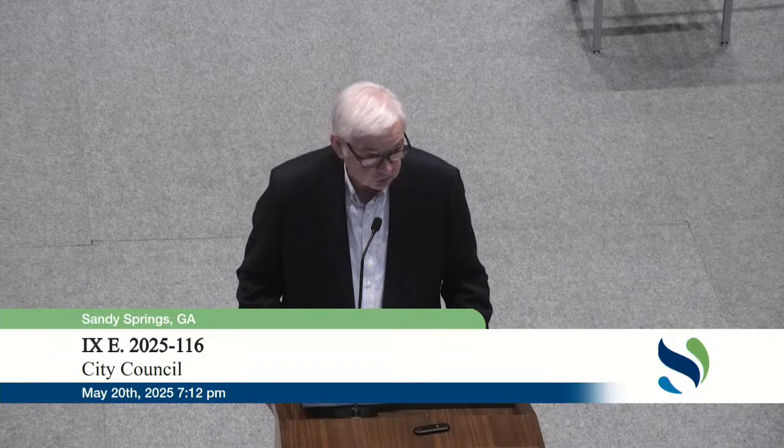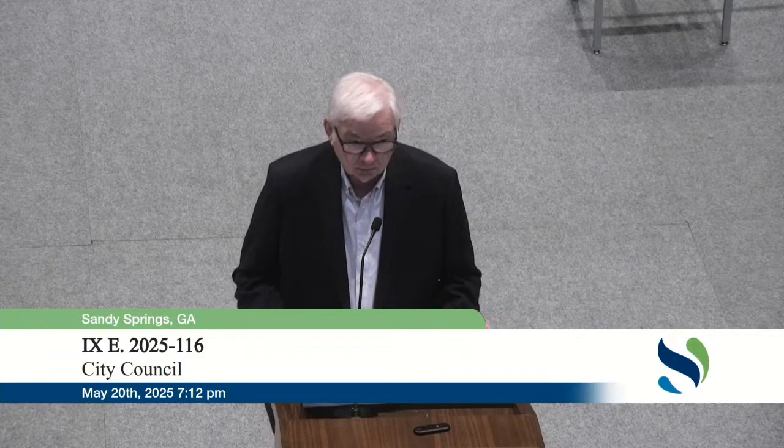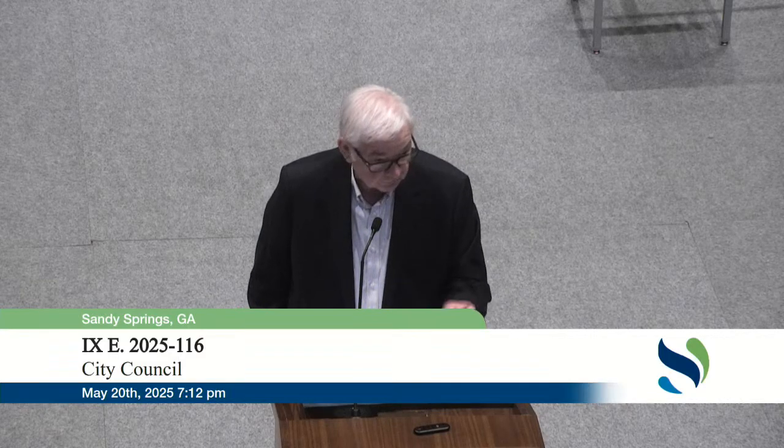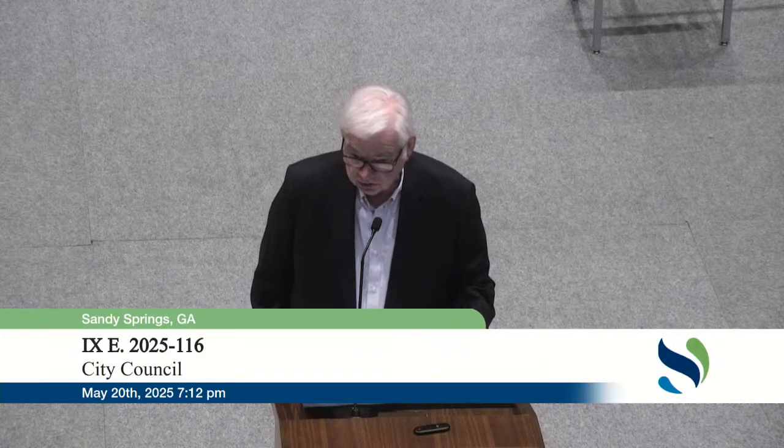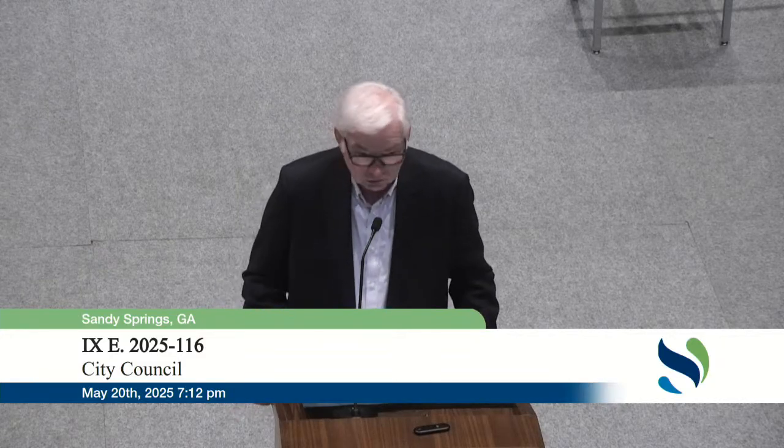With that, staff recommends this attached list of streets as the city's proposal to the state in the interest of receiving these some $1,276,784.86 of grant funds. The current estimate for these street repavings, just to be on the safe side, is slightly higher than the amount at $1,312,000 and change, in the interest of ensuring we use all of the funds.